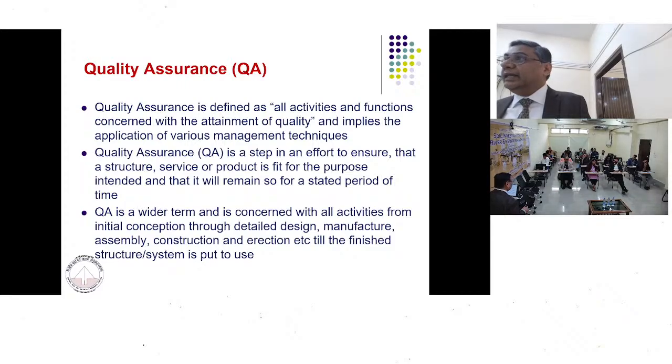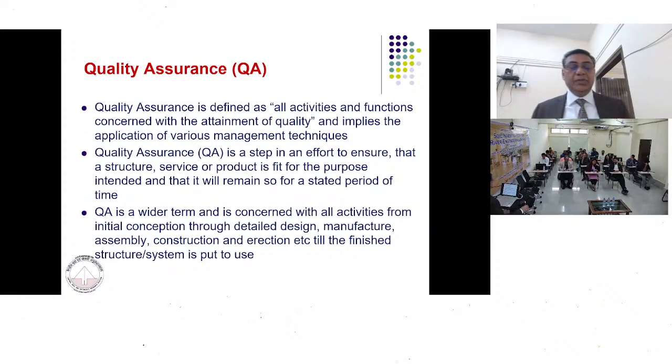Are they maintaining the records or not? Have the correct codes been taken into consideration to check the quality control? Have you seen that the limits which have been specified for those particular products are taken into control or not? All these things will be taken care of by the quality assurance people.